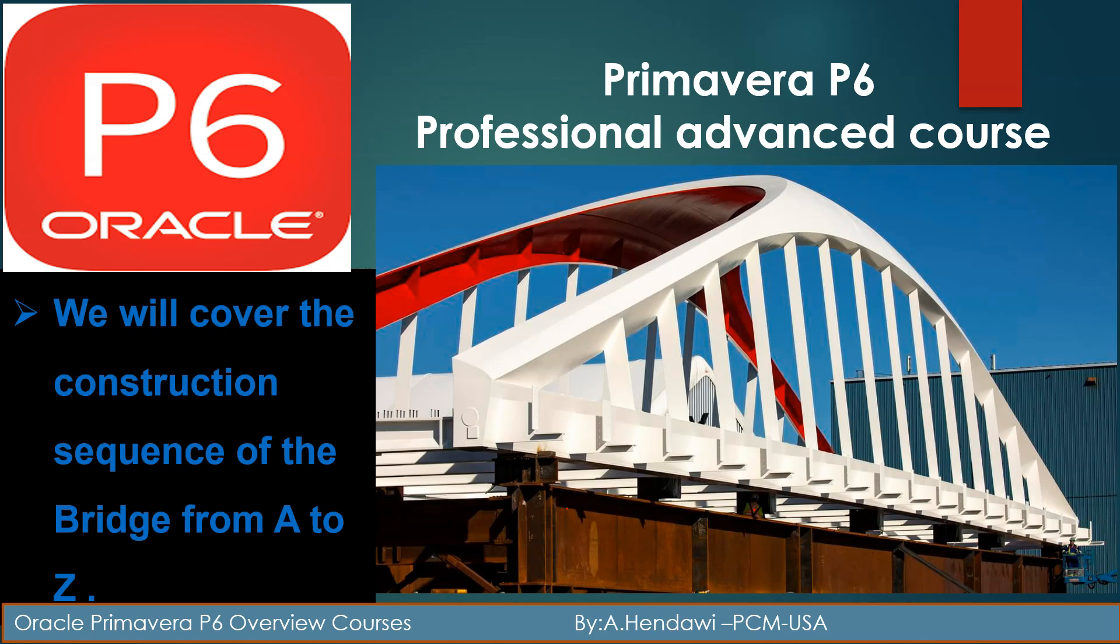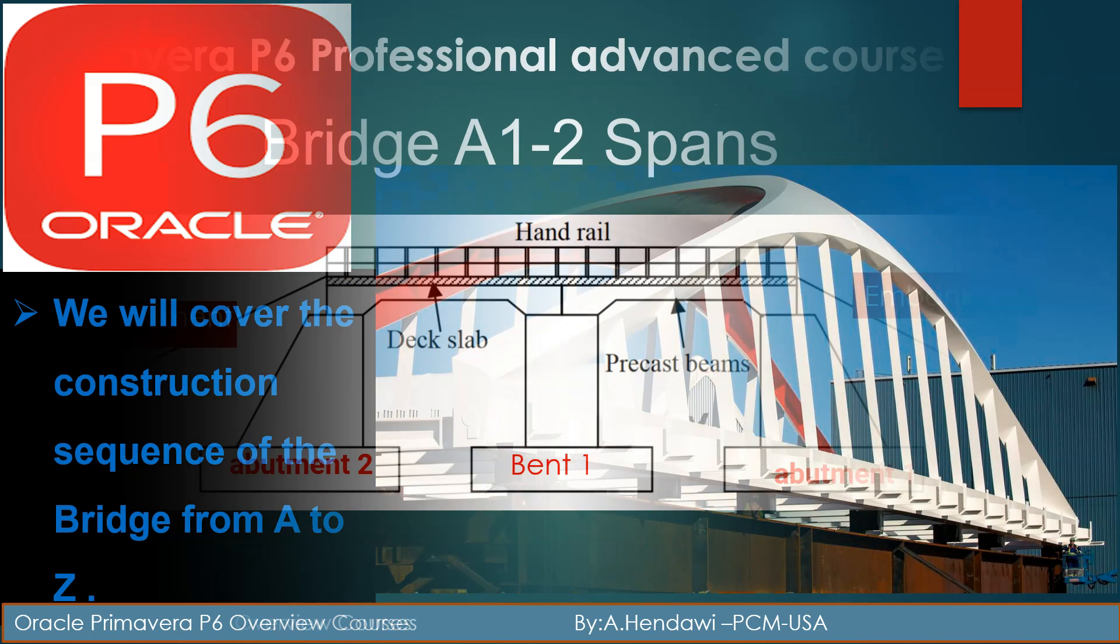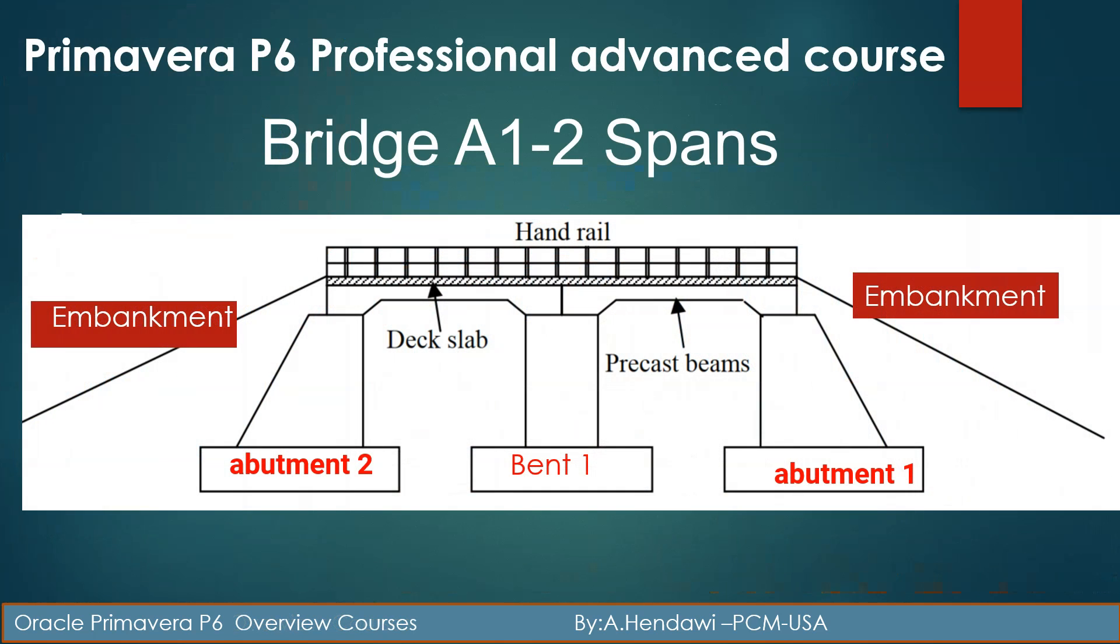What is your baseline? Before you create your baseline you have to agree on the schedule, review with your team, and get it agreed by the client.